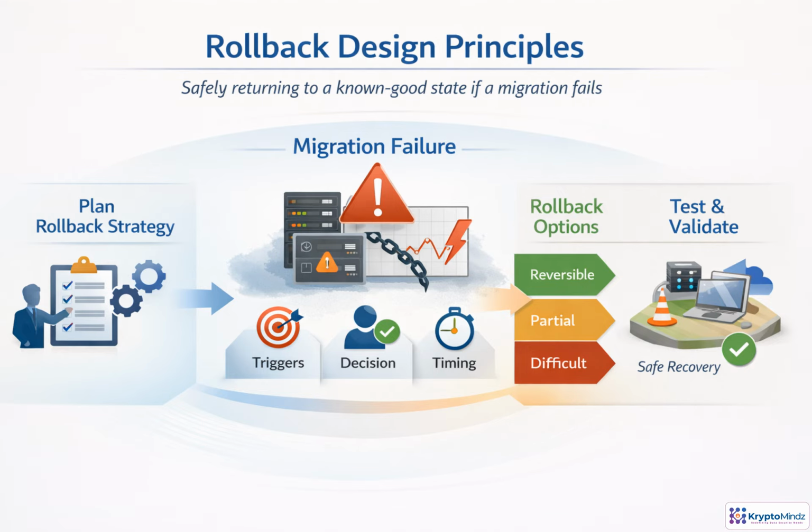Rollback is not emergency improvisation. It is designed before the migration begins. For each planned change, define what you will monitor, what conditions count as unacceptable impact, and who has authority to stop or reverse the work. Timing matters too. Some fixes are safe only within a short window.